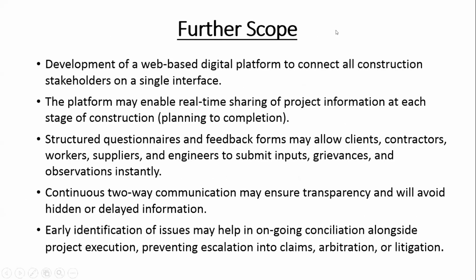Now we have the further scope. Development of a web-based digital platform to connect all construction stakeholders on a single interface. The platform may enable real-time sharing of project information at each stage of construction, from planning to completion. Structured questionnaires and feedback forms may allow clients, contractors, workers, suppliers, and engineers to submit inputs, grievances, and observations instantly. Continuous two-way communication may ensure transparency and avoid hidden or delayed information. Early identification of issues may help in ongoing conciliation alongside project execution, preventing escalation into claims, arbitration, or litigation.